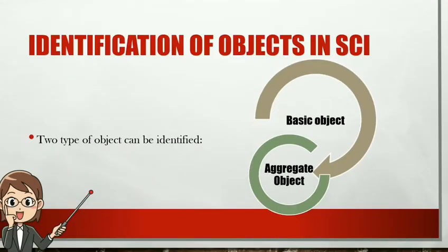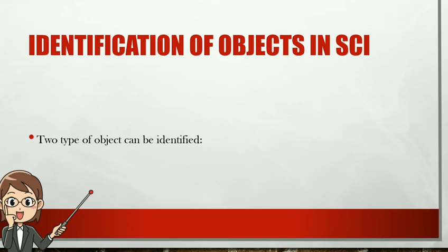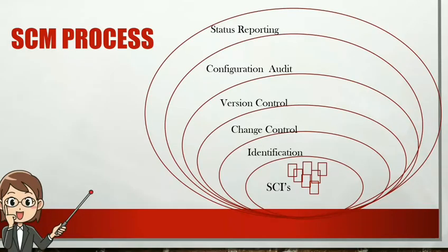The next phase, which we have already mentioned, is the configuration audit. The configuration audit addresses some important questions like whether the change mentioned in the ECO is applied or not, whether the formal technical review is conducted or not, and whether the software process was followed in accordance with the engineering standard or not.